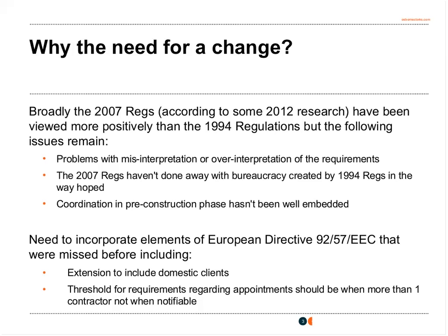And the other area of significant change which we're going to talk about throughout this webinar is what is the trigger for formal appointments and paperwork. Previously, for those of you familiar with 2007, the trigger was all about whether or not your project was notifiable to the HSE, and that meant that it was the more complicated or larger projects generally who required the formal appointments and paperwork. That is now being changed, and it's been seen that the EU directive actually required application to all projects where there was more than one contractor involved.